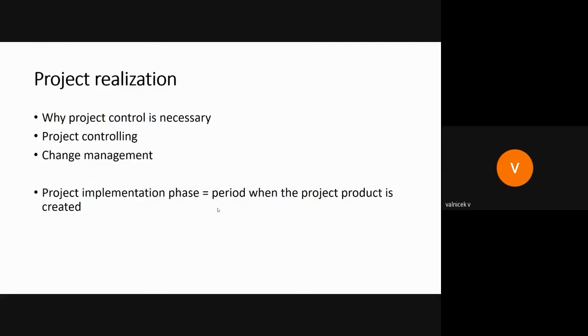Therefore, it will be really rare that you will participate in a project where there will be no changes. Ideally, you need to agree at the beginning how the changes are going to be managed, who are going to do it, who are going to pay for it. So it's quite difficult.